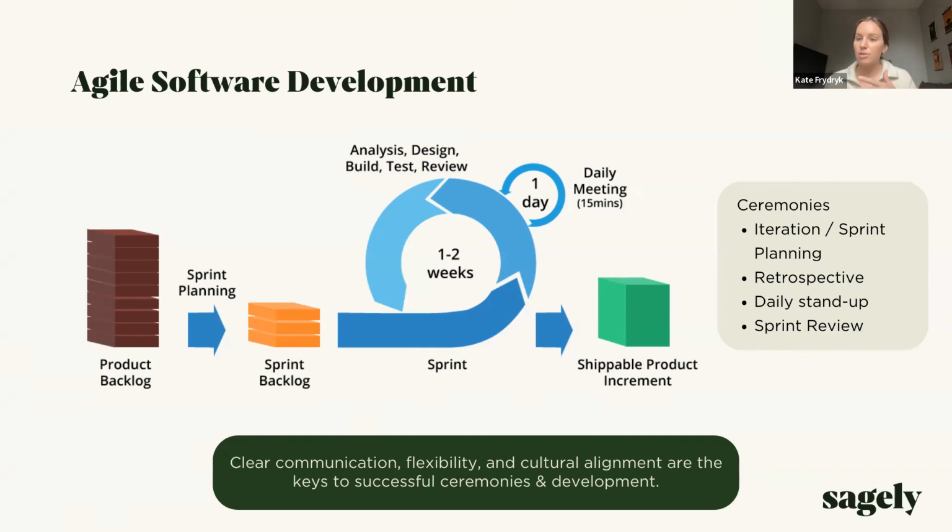But we know, because we're anticipating change, that we don't want to get too far ahead, because if we're writing user stories for 3 months from now, that's not really acting in the principle of anticipating change. So we want to have a decent runway of user stories and a decent runway of the backlog, but no more than 2 to 3 sprints out.